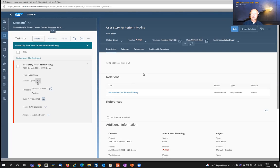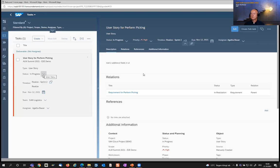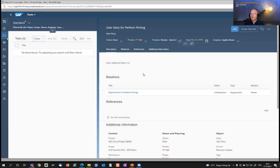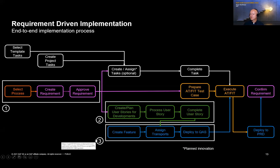As a developer, I would now go to that user story, open it, and set it to 'in progress.' I skip the important steps happening in parallel: the developer needs to create a transport in the managed system, do the coding, and run a unit test. After this is done, the developer marks the user story as done, goes back to the overview page, and the user story disappears from the upcoming tasks.